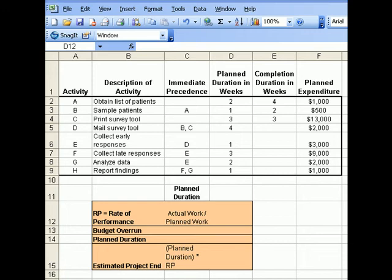First thing is to calculate the rate of performance. The rate of performance is calculated by taking the actual work divided by the planned work. Since we have three activities that have been completed, let's focus on those — activities A, B, and C.